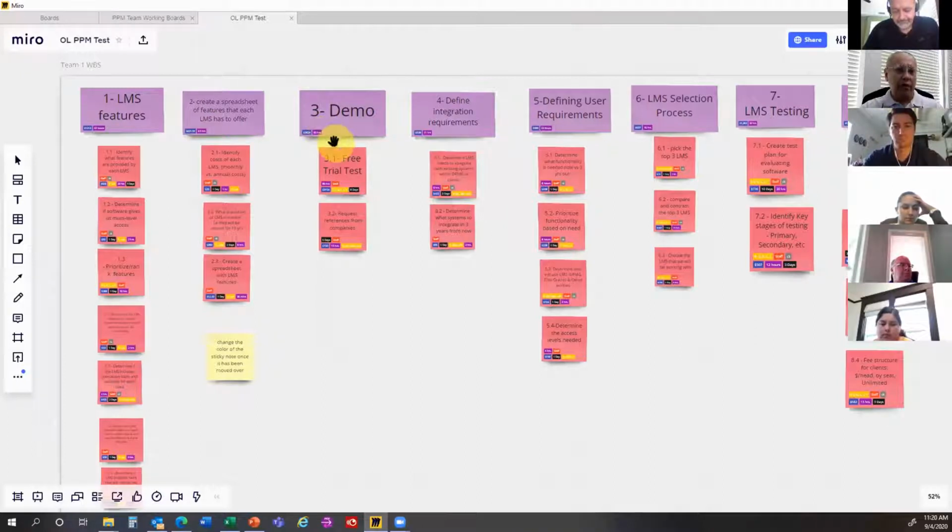and it also helps folks. Once you define what work is expected from the contractor, and if you have an internal figure, most companies create a budget of how much they want to spend for a capital expenditure project. So this is a way to say, okay, these are the major tasks, and this is what we think those costs are. You now have a baseline to compare when you get the proposal in from your subcontractor. It's not going to go all the way down to the detail level, but now at least you can start saying there are questions that are going to be asked.